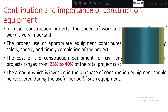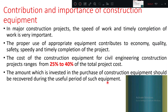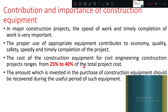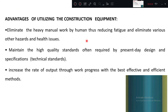The amount invested in purchasing equipment should be recovered during the useful period of that equipment. For example, if 20 lakhs is invested in equipment, that amount has to be recovered during its useful period, which is generally 5 to 10 years.